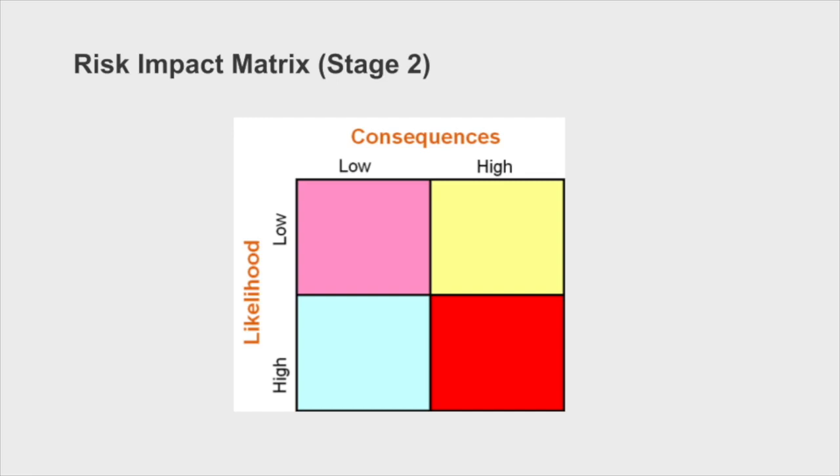So once we evaluate what is the likelihood and what is the consequence, then we can put them on this kind of what we call a matrix here. And what we're looking for to spend our time on is high consequence, high likelihood issues, the light blue box. Those are the ones that we need to focus on because those are the most likely things to happen, and those couple with likelihood to be the highest consequences. We have to address those.